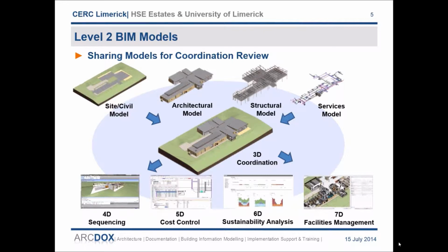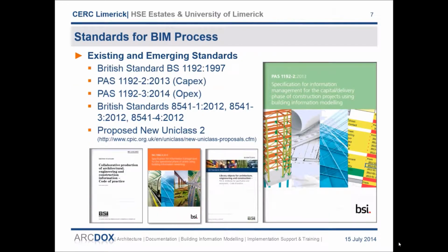The project team are encouraged to make as much use of BIM as they have the capability to do, but as a minimum the client and design team are looking for 4D sequencing, programming information and 7D incorporation of all asset information required for facilities management. Unfortunately, the benefits of the BIM process will not be realised unless there is a commitment from all participants to contribute to the process, and for that there needs to be a clearly defined standard and managed strategy that requires every participant to adhere to when making their contribution to the project.